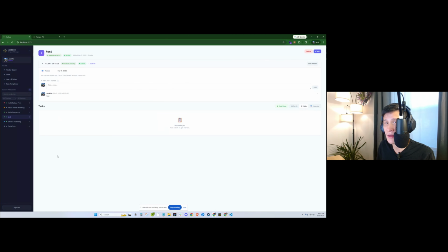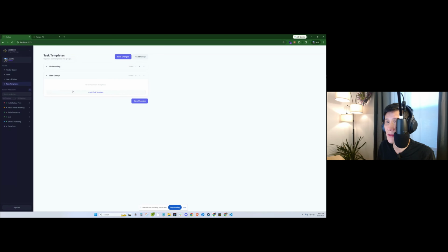What's really interesting about this is that I asked it to build a task template. So what this is, I create a group. I already have one here I'll call onboarding, but I'm going to show you a new one. This group is going to be called new SEO, right? So what am I going to do? I'm going to check keyword research, search keywords, priority high. And then you can add some subtasks called check SEMrush, right? And then check Ahrefs, right? And then you can save it.